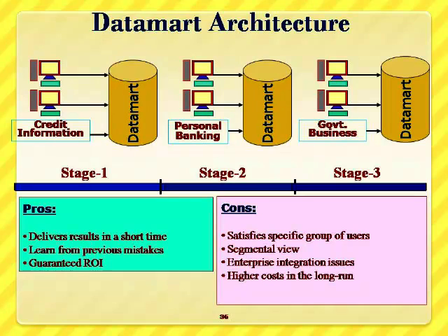What are the pros? Delivers results in a short time. I need not wait for a long time to collect the requirements, design the system, and implement. This small application I can do in a shorter time. Mistakes made here need not be repeated later, so as the stages go on, the number of mistakes will be reduced by experience. That gives better results in building a data warehouse.